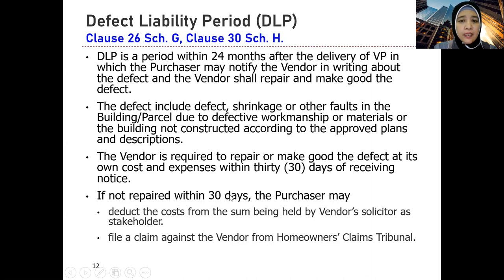If not repaired within 30 days, the purchaser may, one, deduct the cost from the sum being held by the vendor's solicitor as stakeholder. Remember the third schedule that I showed you just now, at the very end, 5% will be retained by the vendor's solicitor. 2.5% will only be released after 6 months, kan? Then the remainder will be released after, say, 18 months of the vacant possession delivery. So deduct from the 5% balance,